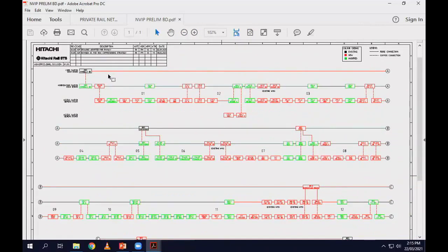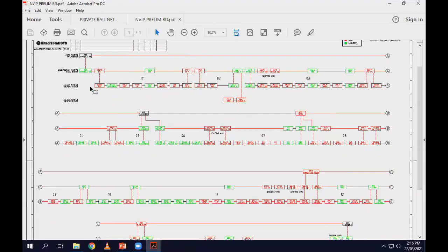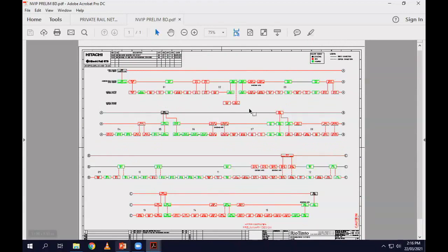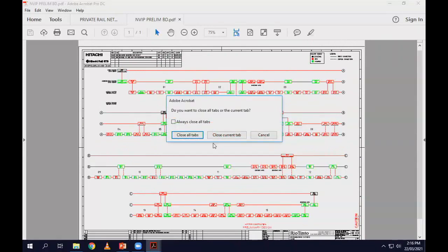It doesn't tell you equipment, doesn't assign any IDs or anything, because the purpose of the concept design is not to build, but to estimate cost and estimate time. So this is your IP network, all you have to do is count how many sites and how many materials of different types. So I will close these.